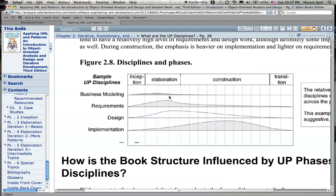Some of these projects extend over several months, and the people who work on requirements at the beginning of the project may not be the same people who work on requirements at the end. The people who work on implementation may be in a whole different country from those who work on design, and the people who work on design in one iteration may be different in another. So documentation and standardizing the documents we produce at the end of each discipline — each activity at each time — is critical. Business modeling in inception has some documents; in elaboration it has others, and so on.